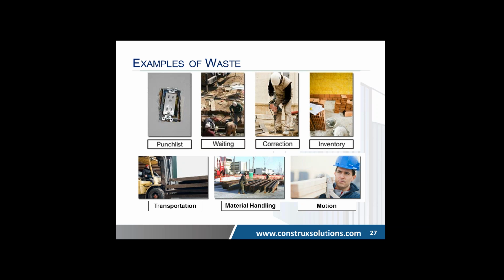Correction, same thing as punch list. Putting inventory in the way of people. I've been on projects where there were piles of glass everywhere, while piles of mechanical equipment too, where both were trying to work, and they're having to step over all their equipment, and this was costing money, lots and lots of money on every single floor, just because there wasn't a discussion about whose materials should go where. It was just thrown throughout the entire site, so inventory being in the way.